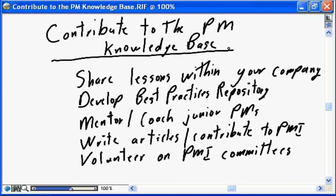One requirement of the PMI code of conduct is to contribute to the project management knowledge base. On first consideration that often concerns people — they say, well I'm not a writer, I'm not an author, I'm not going to create textbooks, and I'm not at a level to work on the next edition of the PMBOK guide. But contributing to the knowledge base can be as simple as doing proper project closing and sharing lessons learned within the company — a lunch-and-learn at the end of your project where you share what you learned, what you would do differently, and how you can help your peers become better project managers.